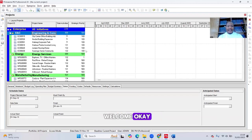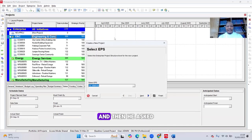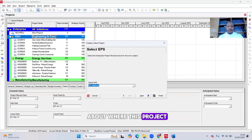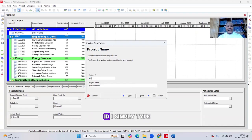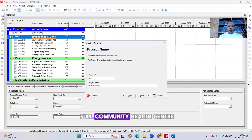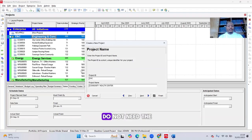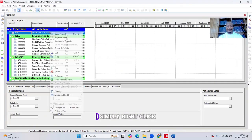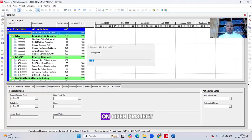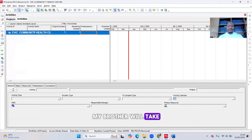To create a new project, go to File, then click on New. It asks you to select your OBS — I'll leave it at All Initiatives, then click Next. The project is Community Health Center. Under the project ID, I type in CHC, and under the project name, I type Community Health Center. I click Finish. To open the project, I right-click on it and click Open Project, and Primavera takes me straight to the Activities page.